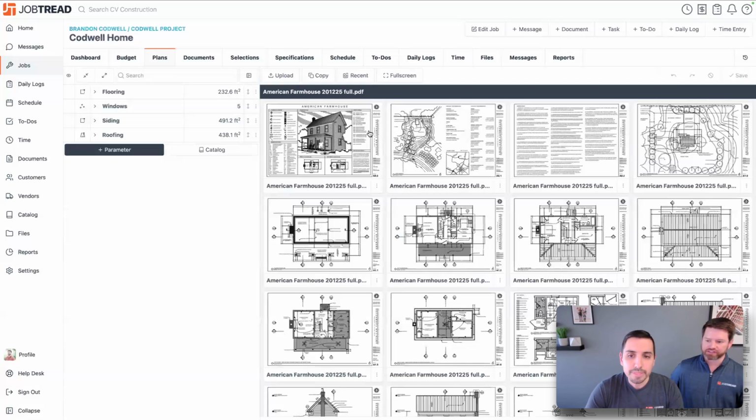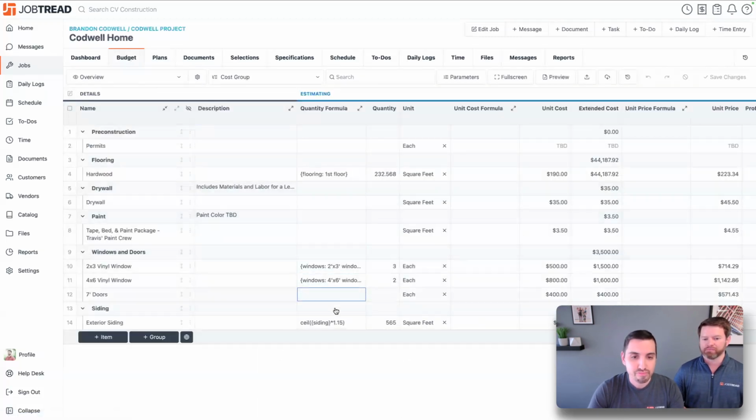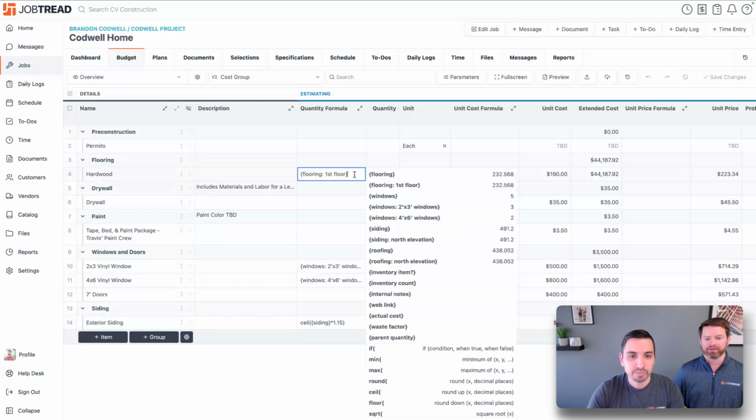Well, I've just been watching the chat here just a little bit. Appreciate Anna and Travis and everyone who's responded, but there are a lot of questions about how to use production rates to calculate, let's say, the number of hours it might take someone to do that. All of that would be done in the budget, just like you can do today, but using these formulas. As long as you know what your production rates are, you could either hard code them into the formulas, or you could have a custom field for the cost item if you wanted to have a production rate where maybe you modify it within each budget, but that formula could reference the production rate.